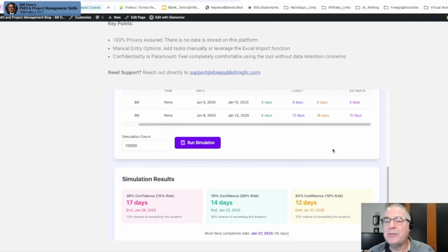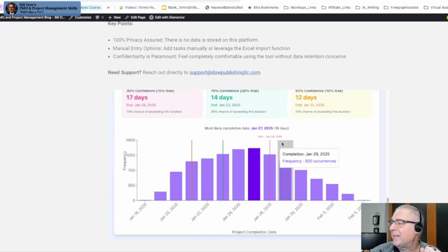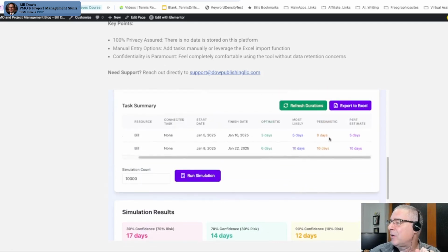So now you're starting to see when you add more tasks to this, it gets a little bit more complex, but the math is still the same. The math works out perfect. And I'm excited about this because how many times are we just getting single point estimates, and we can clearly see you should be doing Monte Carlo simulations. You should be doing the right set of PERT analysis on each of these tasks to give you your best chance of when it will finish. And again, this has it finishing at 27 days. So 16 days. Your PERT estimate is 15 days.